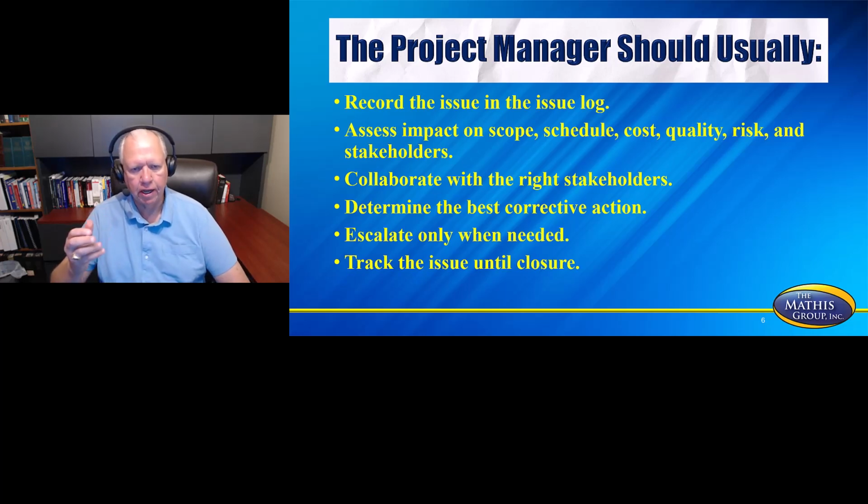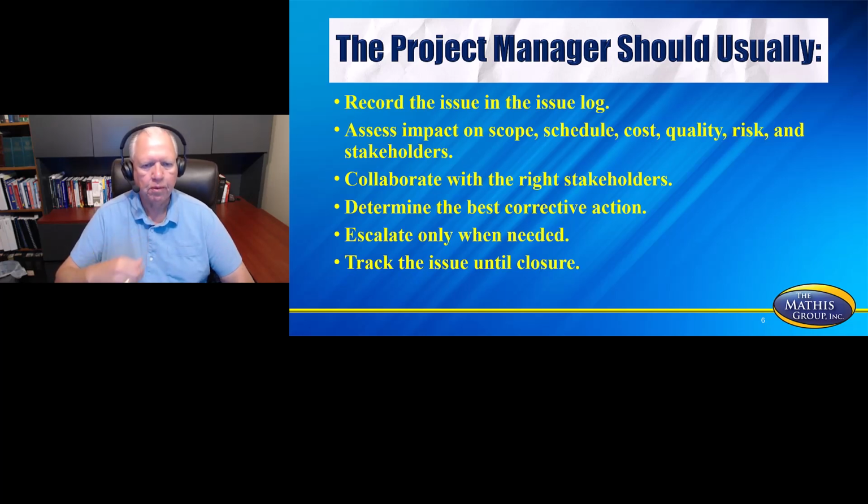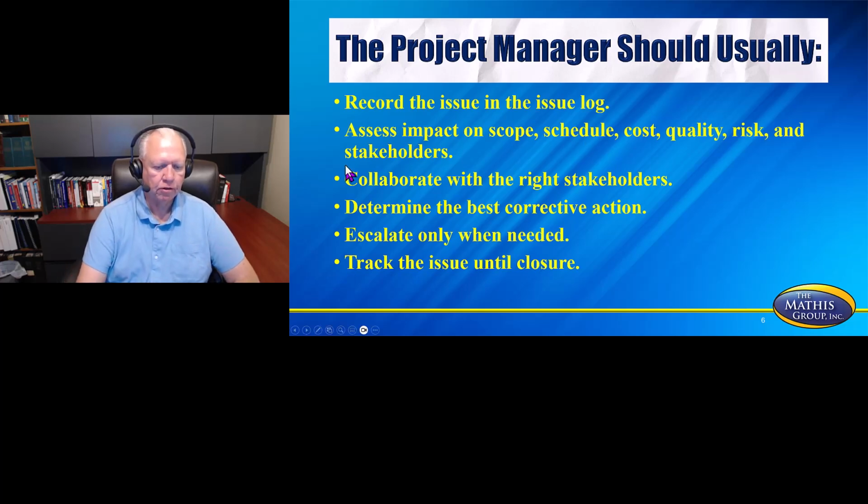You don't escalate every risk to someone else. Remember, the project manager typically on the test has power, and so you're not going to escalate unless this risk is going to impact something far bigger than what your project is, such as a program or the organization.